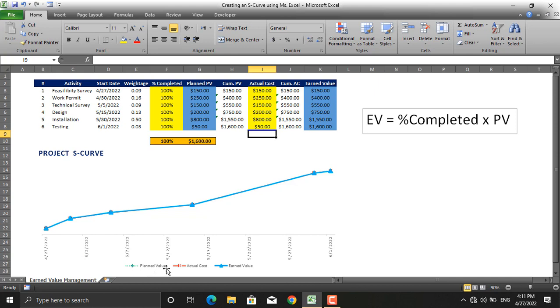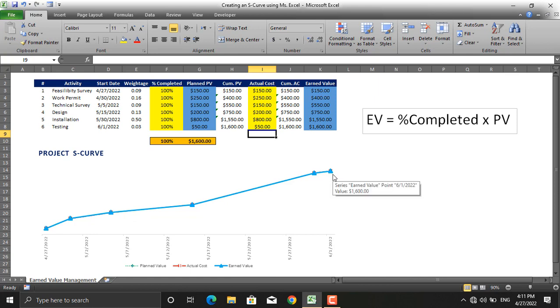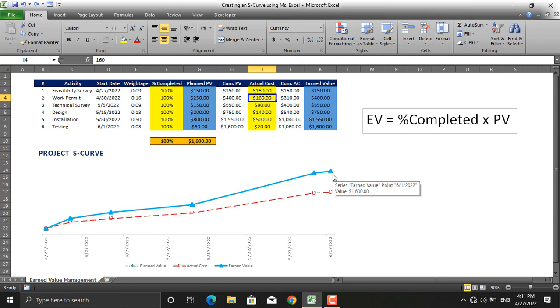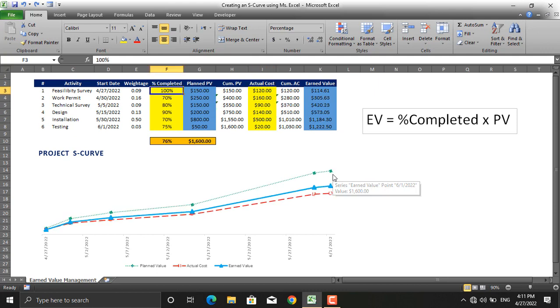As you can see, the planned value, actual cost, and earned value all match together to create one single line. If you go back to reality they will get far away from each other.